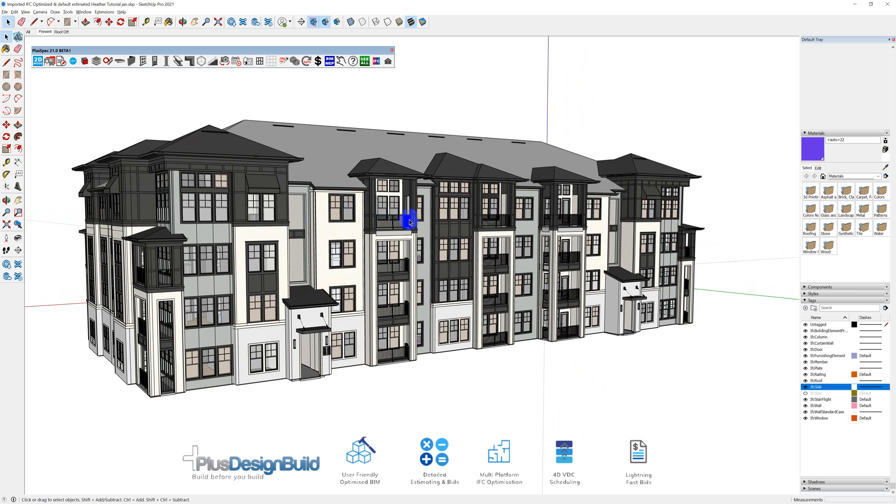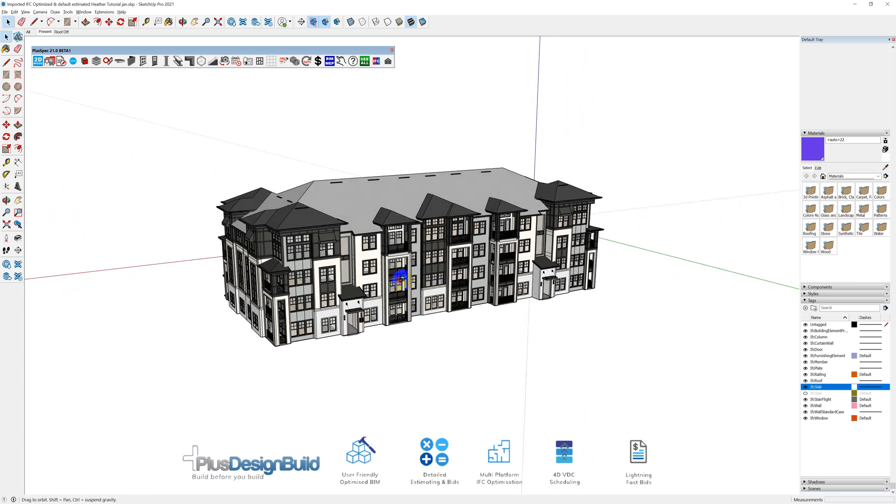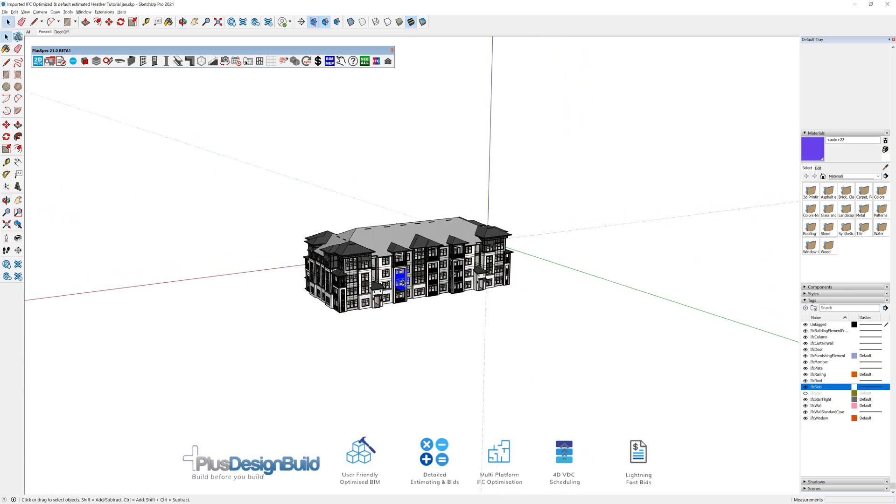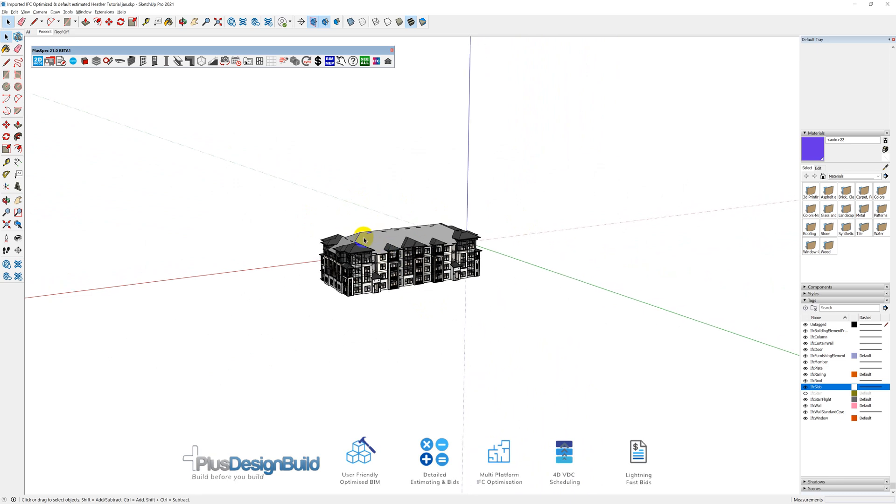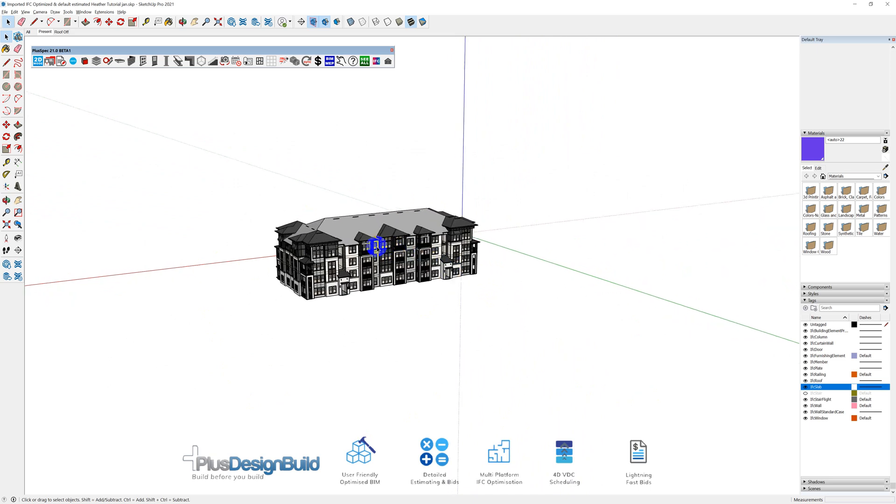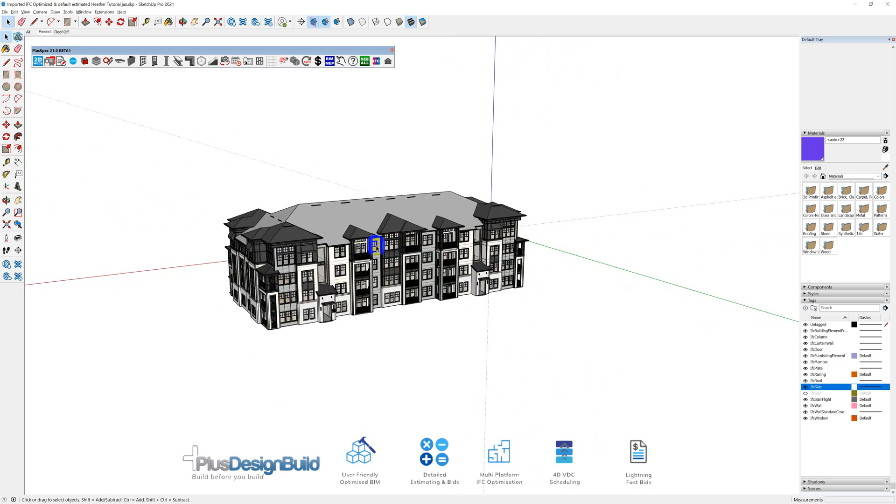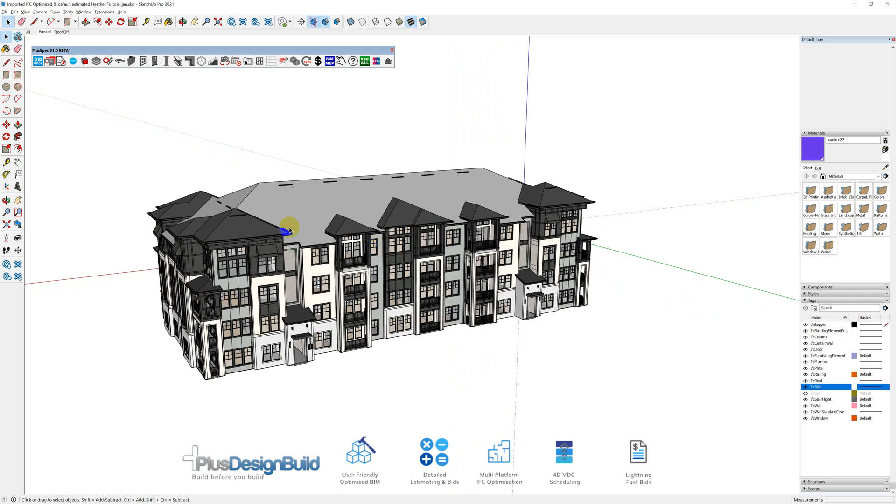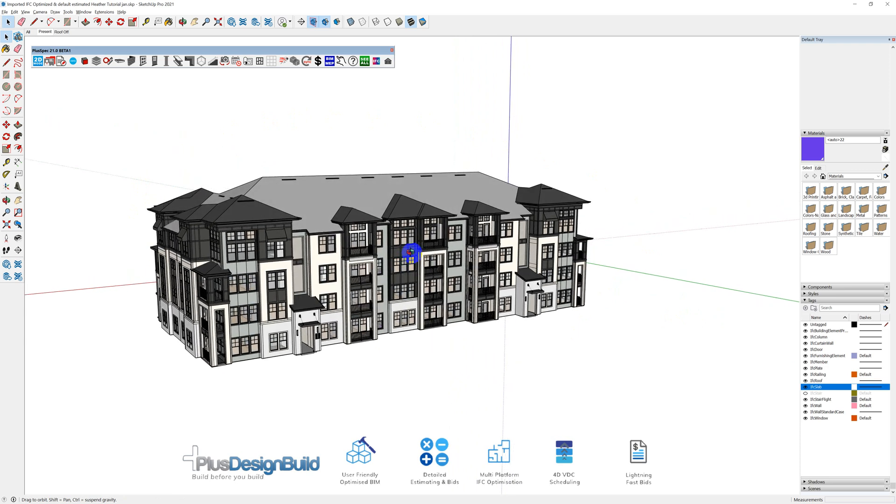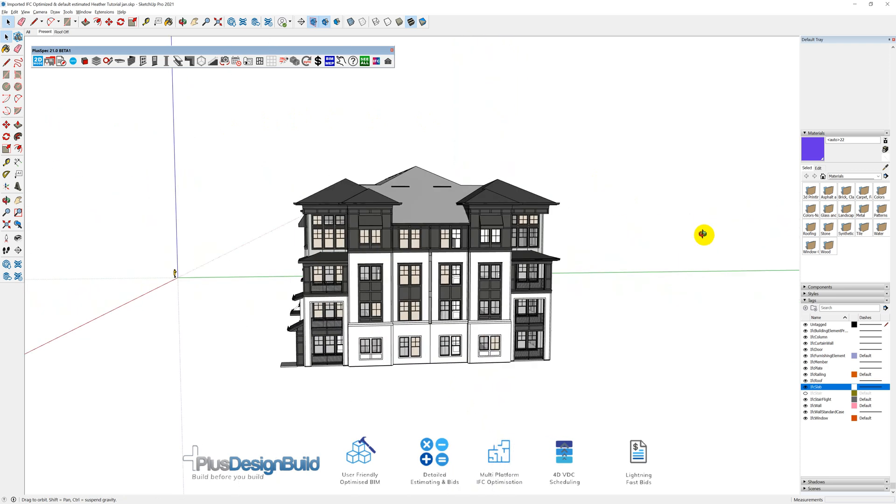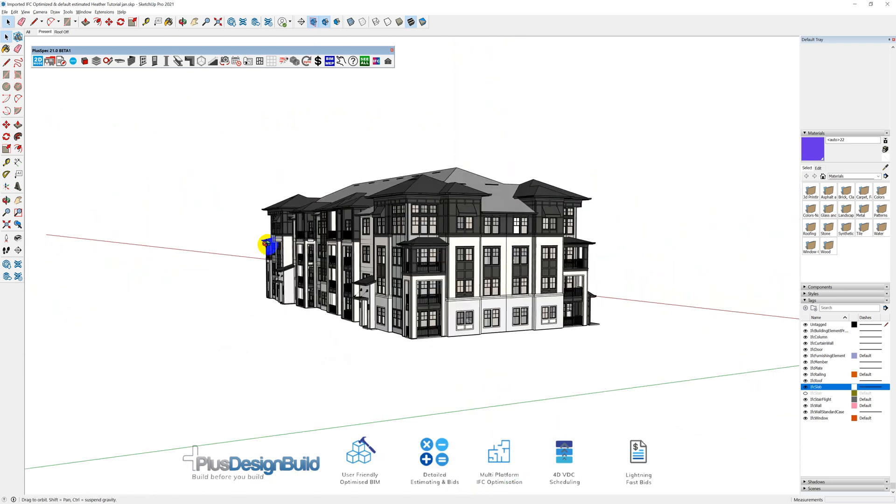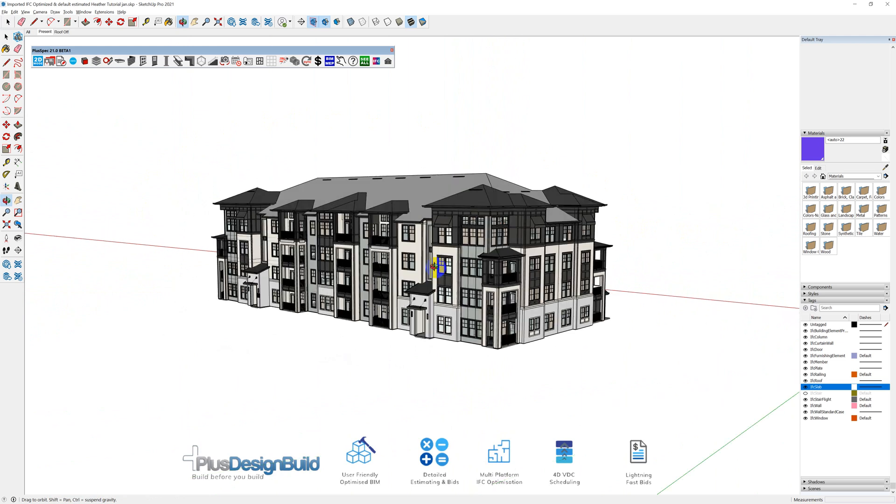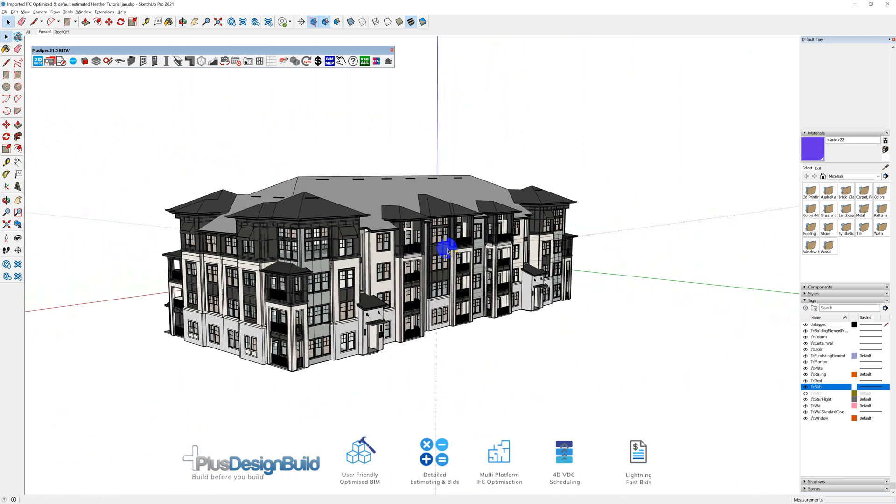In many cases, if you try and export a full IFC model. So for instance, this is just one block of units or condos. If I tried to export five blocks of condos via IFC, Revit's not going to do it. So SketchUp will import a huge IFC model, but it'll be slow. So it's a good idea to break your project down before you export your IFC. And therefore, you can actually be more efficient when you're working. And you'll notice that this is running very, very smoothly as I kind of navigate around this project.